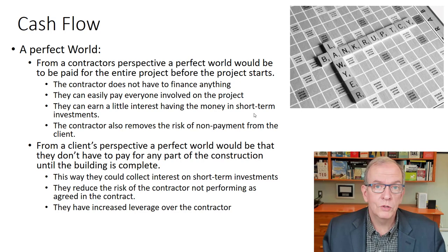You know what we used to do? We used to put a premium on the pricing so that any interest that we would have to pay for financing would be covered. And most people bidding on those types of jobs had that premium built into it, so it was kind of okay. It's hard though if you have somebody that's undercutting the other prices when you're bidding on the lowest bid. You're always trying to have your prices as tight as possible.